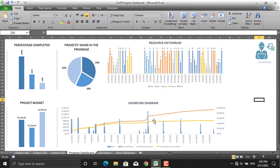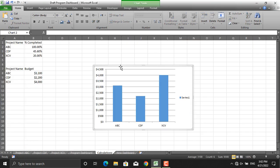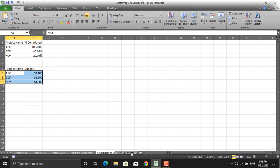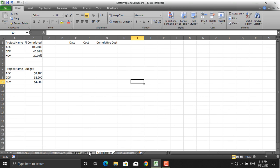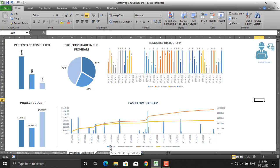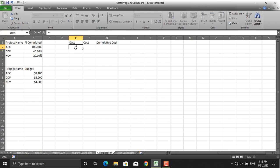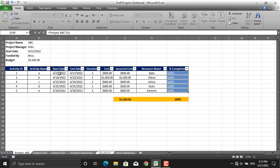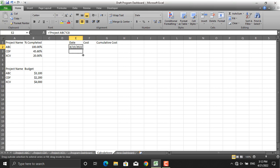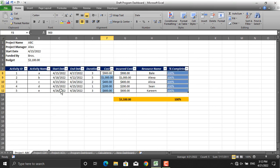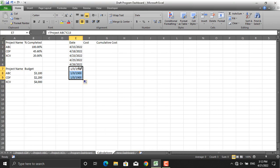Next is the project cash flow diagram. To create a cash flow diagram like this, you need date, cost, and cumulative cost. Two types of costs can be shown: planned and actually incurred. For the sake of keeping the video short, I will only do the planned cost — you can apply the same method for actual cost. For the date column, I will equal the cell to the start date of the activity and drag it down for five cells, matching the five activities in project ABC. Empty cells beyond that would return the earliest date Excel can provide.